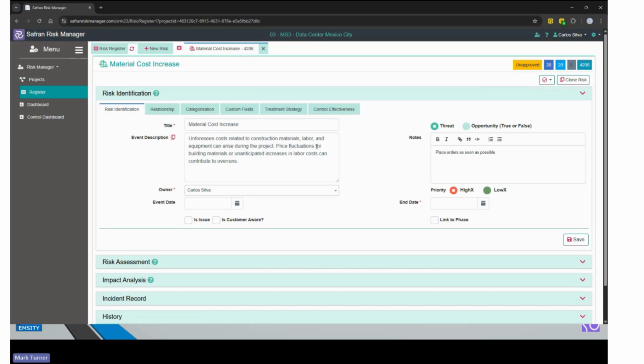When's it likely to occur? How's it going to be categorized? What are the key assessments with regards to the likelihood and the impact? Have we made a good judgment on our first pass, or do we need to be understanding more what the pre-treatment likelihood is? And then, of course, the true added value, what actions are we going to take now that we have identified that risk? And it's during that action identification stage that we want to assess the post-treatment position to better understand the benefits derived from the actions which we're taking.